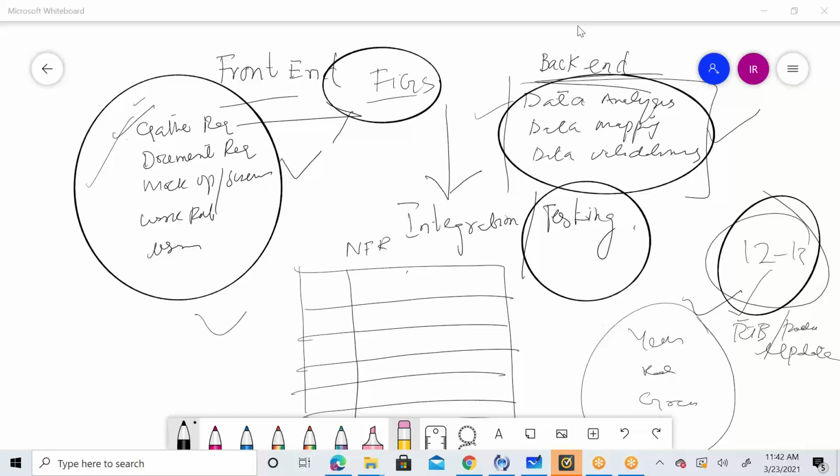So day by day, gradually, you're not going to write from page 1. Whatever information you already have available, you get from either the BRD or your PMO office, like risks, assumptions, dependencies, and constraints. The first thing I put down was RAIDs: risks, assumptions, dependencies, and constraints. The second thing I put down was the scope of the project. Gradually, slowly, every day you will be getting this information, because you're going to have consistent meetings, 6 meetings all day. As a BA, 80% of your work is nothing but meetings, taking those pointers and notes, and then putting them into the document.